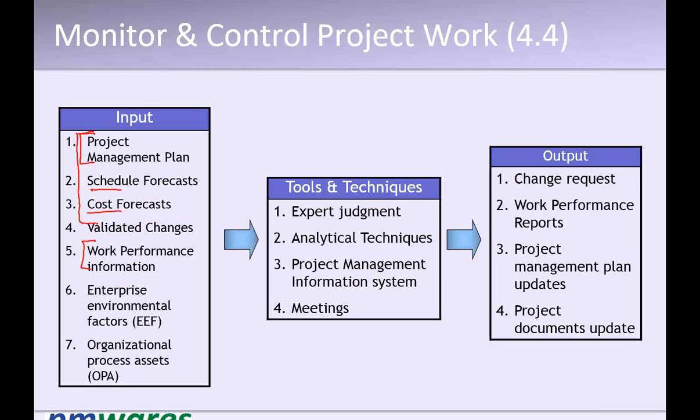So against the current plan, we compare how the work is being done using analytical techniques. And there are validated changes. What are validated changes? The changes which are already validated, and now we are checking in their execution whether they are implemented properly or not.